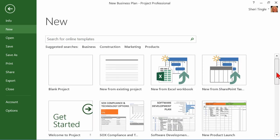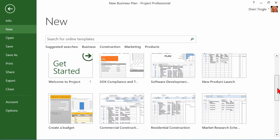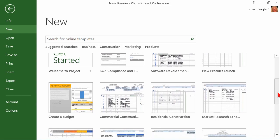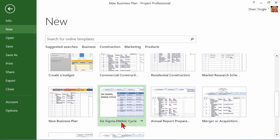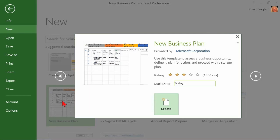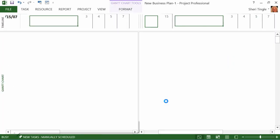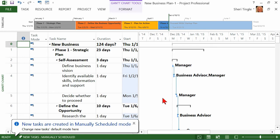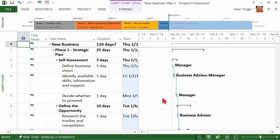And I just want to open one more because I want to focus on something when this particular project opens. So I'm going to go ahead and click on the new business plan. And when I click on new business plan, again, we have to do the date. So I'll do 1, 1, 2015. I'll click on Create. And see the bottom left-hand corner? New tasks are created in manually scheduled mode. It warns you. It tells you when it very first opens how tasks are going to be scheduled. And then it tells me at the bottom on the taskbar. It remains on the taskbar that new tasks are manually scheduled. And as you're working with your project, that's going to be extremely important that you know what the default is and you know how projects are being scheduled. So go explore. Go let Microsoft help you out with some of their suggested templates so that you cannot spend so much time thinking. You can spend your time developing and designing a template that someone else has already started for you. You can tweak it to be exactly what you want it to be.